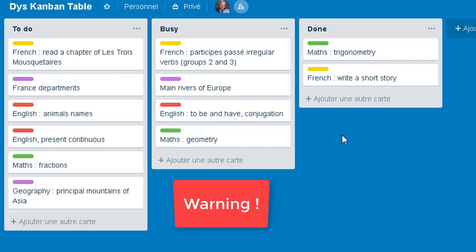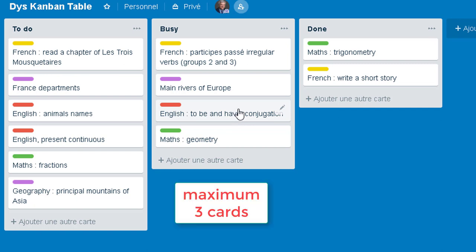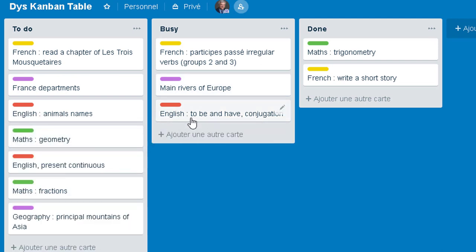But beware — pay attention to the fact that ideally, you shouldn't have more than three tasks at a time in the busy column. Why? Because if you have more than three tasks in the middle column, chances that you will finish those tasks are near to zero. The fewer tasks you have in that column, the more chances you have to finish them.